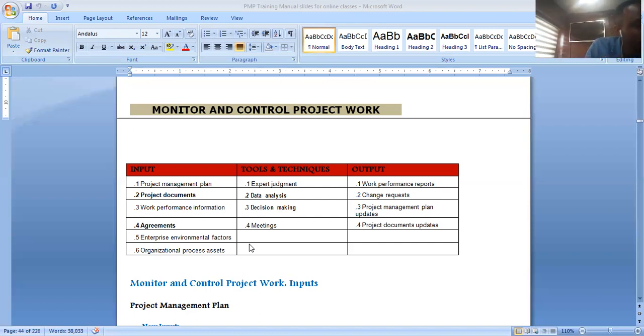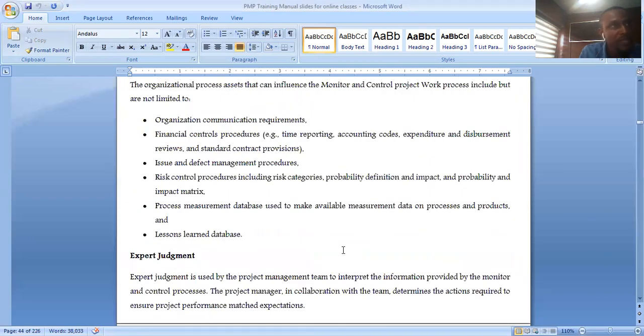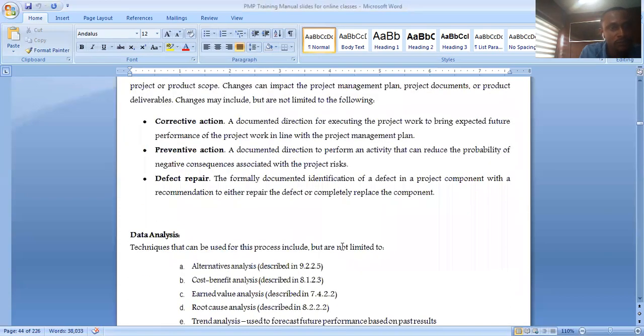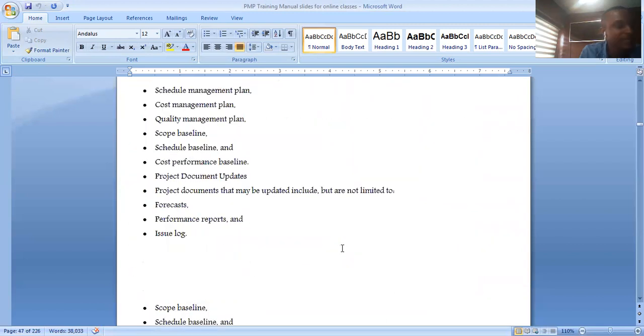That is why you have to integrate the change control process. The client should be aware of your change management processes. Make it clear. And also let your guys know that they can't just wake up and start changing things on the field. It must go through the change management system, the change control process. And the process is when you identify, you write it down and tell us what you want to save and what you want to avoid.